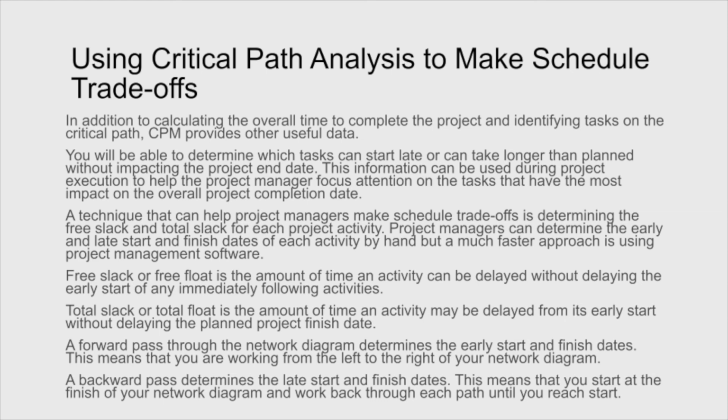Paths outside of the critical path, if they got delayed, may not necessarily affect the length of time of the project because there's already slack in those. In other words, those take less time to do than the total longest time anyway. So critical path analysis really looks at what is the longest possible time required, and everything else has a certain degree of float or slack time in it that could be adjusted.